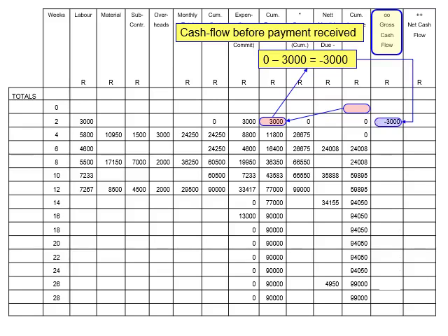The fact that the answer to this calculation results in a negative amount is nothing to be worried about. This is only an indication that you will have a negative bank balance in week 2, and is a result of delayed progress payments, and paying current cost commitments. Then repeat the process for week 4.